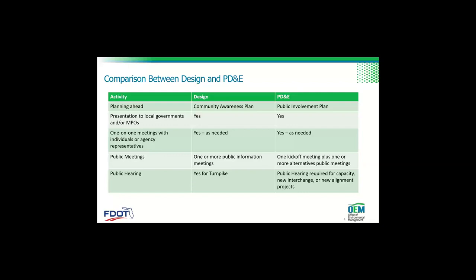Both in PD&E and design, you'll be doing presentations to local governments and MPOs if you're in an MPO area, as-needed one-on-one meetings with individuals or agency representatives, and public meetings. In design, you may have one or more depending on the controversy or complexity of your project.